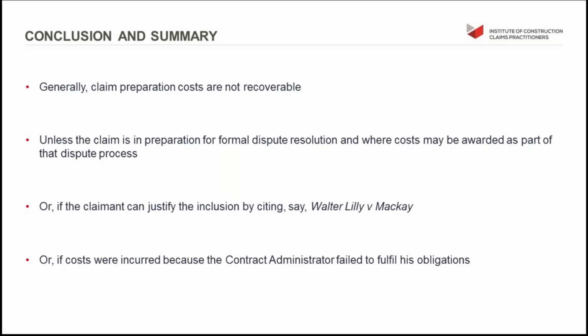And generally, you've got to establish that using those staff caused disruption to your business and that it took them away from their everyday activities. That's as per the Tate & Lyle case. And then obviously keep good records so that you can demonstrate both of those occurrences.